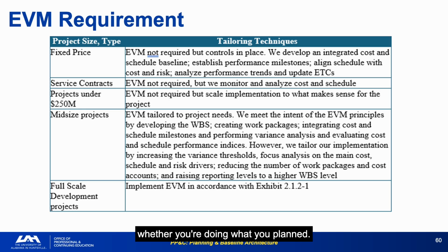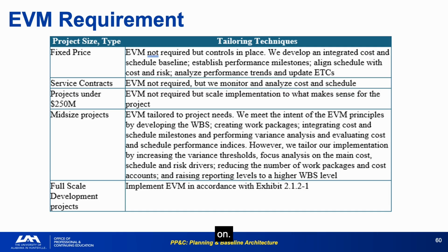The requirement also applies to phase E modifications above $20 million. This is frequently overlooked by programs that completed their IBR years ago and believe their EVM obligation is behind them. The thresholds change periodically. As an analyst, verify the current threshold for your program class and appropriation type. Do not rely on what was true for the last program you worked on.